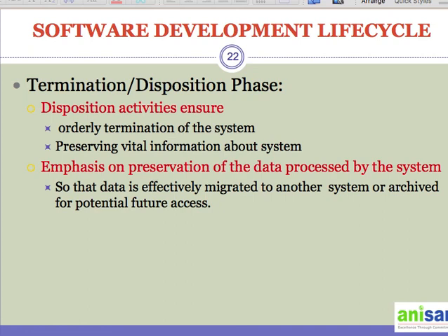That's one part. The second part, once you take it down, you have to take the backup and archive all your data as per the legal requirement. Remember that all your business data is important for you to archive well. And then format all the hardware and release it for future use. Archival must be done so that you ensure who the stakeholders are who need to access this information as and when it is required.